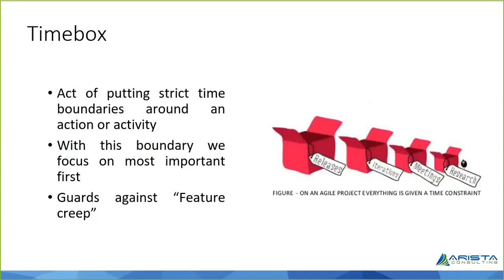Okay, so if that is utmost important, then of course you have to negotiate with the customer saying that if this is important, then I'll have to drop off something else. Because my boundary is fixed. My boundary is 1 month. Beyond that, I cannot deliver. Beyond that, I will not take up anything.